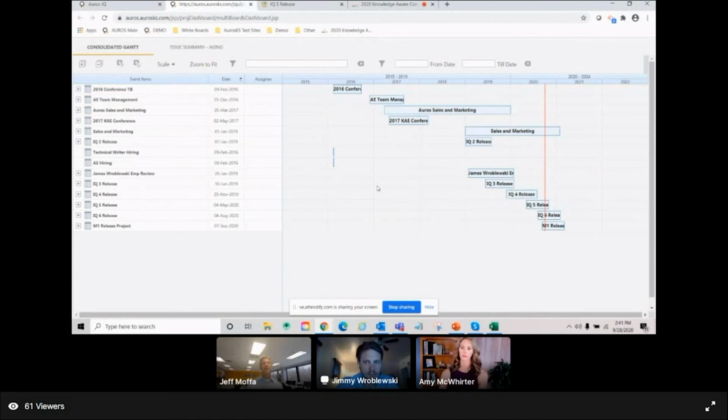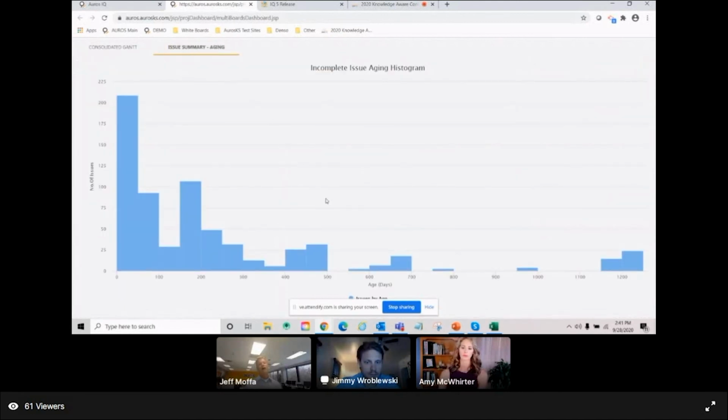Jimmy just added different project types, so it's a little different than the last time he ran it. And then if we go to the issue summary report, it's a very strong set of issue reporting reports that all have drill down. So you can run a whole bunch of different kinds of issue aging reports to find out where the open issues are and how old they are, how long they're staying in each phase. All that stuff is available through this consolidated report.